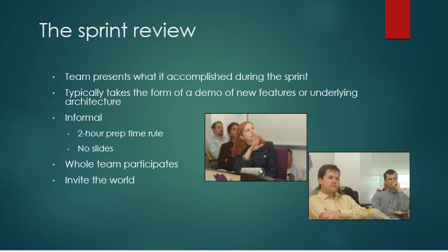The sprint review. The team presents what was accomplished during the sprint. Typically it takes the form of a demo of new features or underlying architecture. Informal, with a 2-hour prep time rule, no slides. The whole team participates and invites the world.